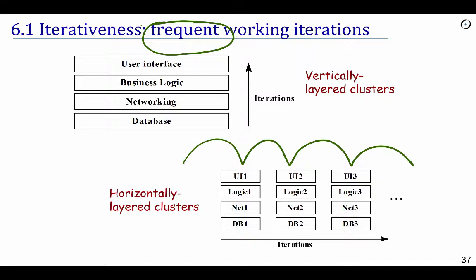So in our example, it's going to have a little bit of database, maybe very rudimentary or just simulated at first, a little bit of networking, a little bit of business logic, and some kind of user interface, but it's already going to be showable to and usable by a typical customer, or a test user, or an embedded customer, if we are using the extreme programming technique. And each one of these iterations includes the entire system, however partial the version may be.